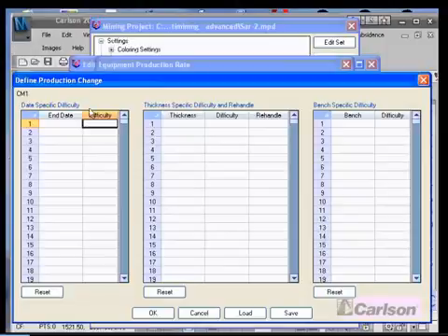Those can be identified and gridded, and taken care of that way. But you can also identify areas where difficulty could possibly be based on the thickness of the clean coal, and you can indicate difficulty based on thickness ranges here. For surface mining, we can also identify vent-related difficulty factors here.